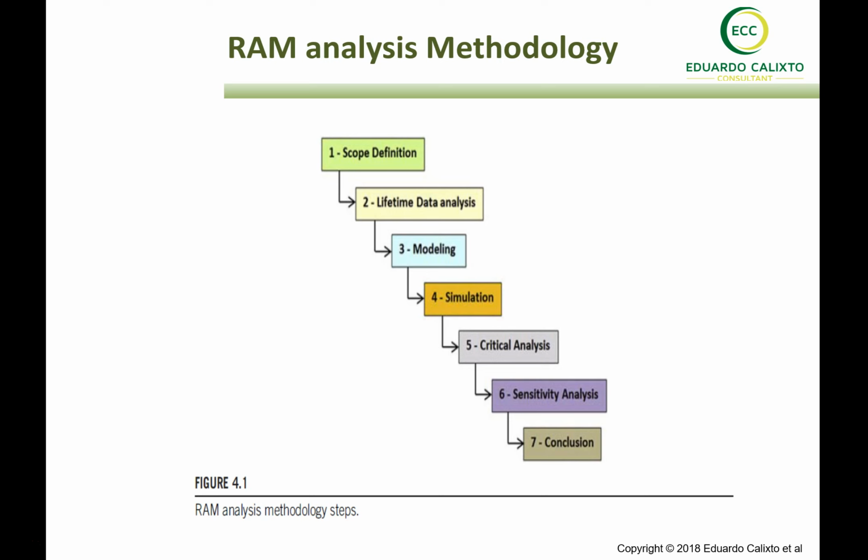So it's very important to get the PIDs, list of equipment, and definitions in order to focus and go forward to the next steps of the RAM analysis without losing time reworking because of wrong scope definition or lack of information in scope definition.